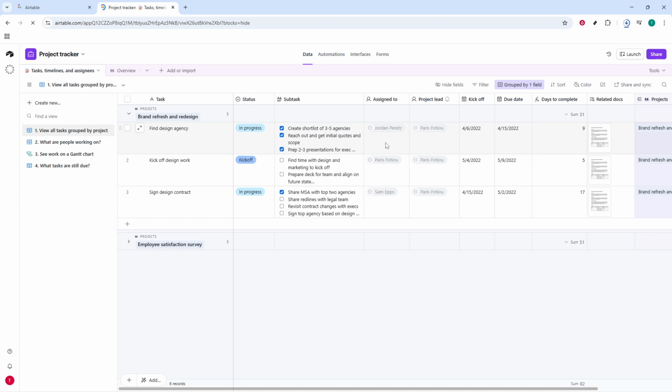With your fields in place, choose a view that makes the schedule easy to track. The Gantt view is perfect for visualizing dependencies and spotting the critical path, the sequence of tasks that directly affects your end date. You can drag bars to adjust durations and immediately see the impact. The Timeline view is great for managing team capacity, placing tasks side by side to see who is busy and where there's room to take on more.